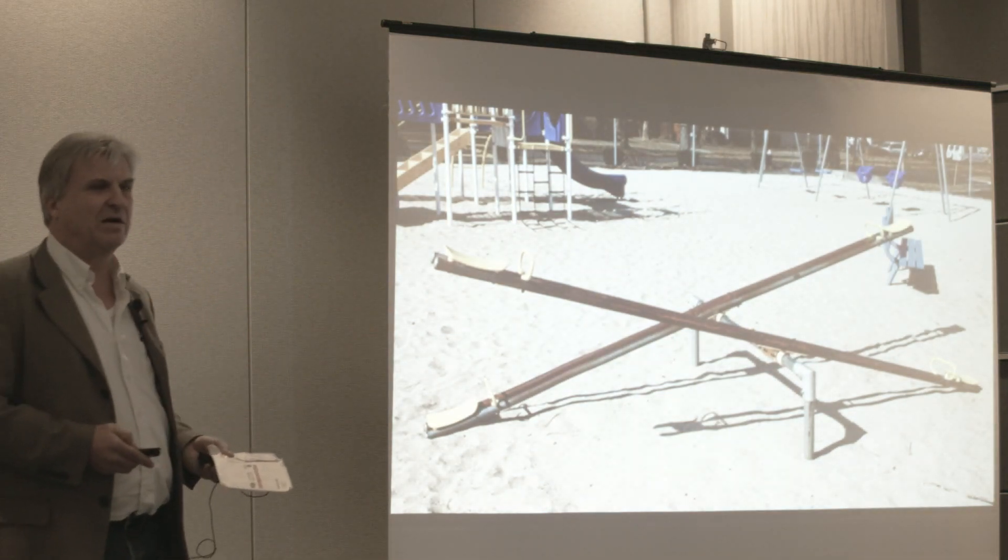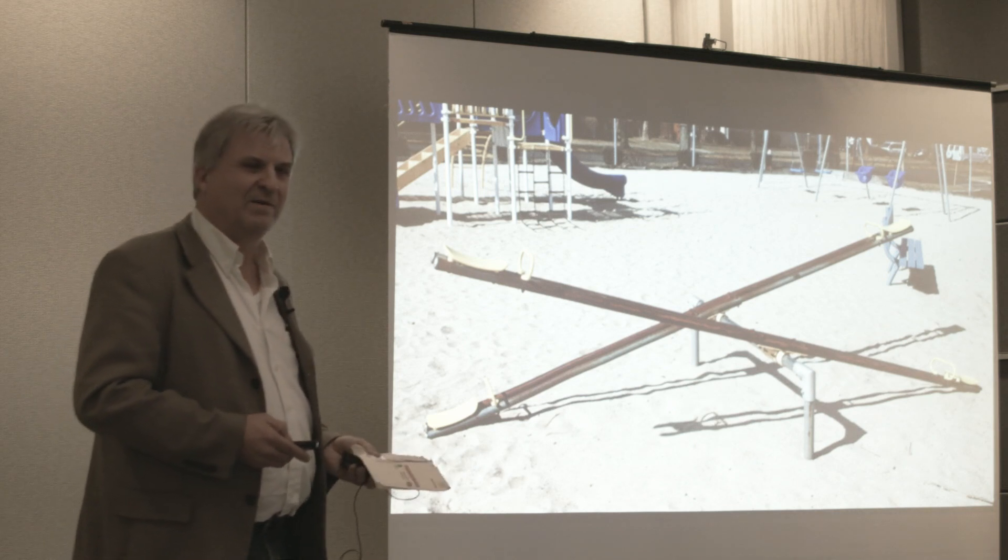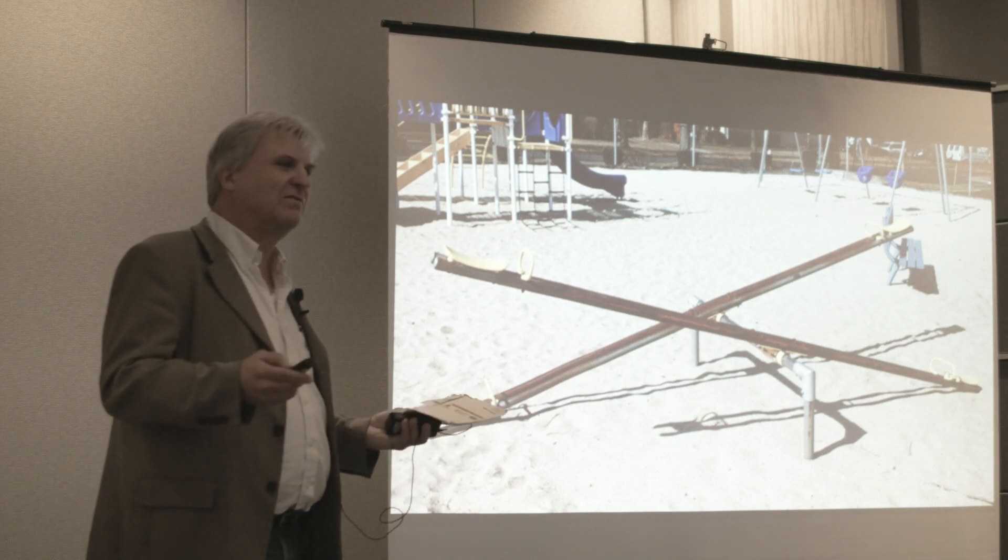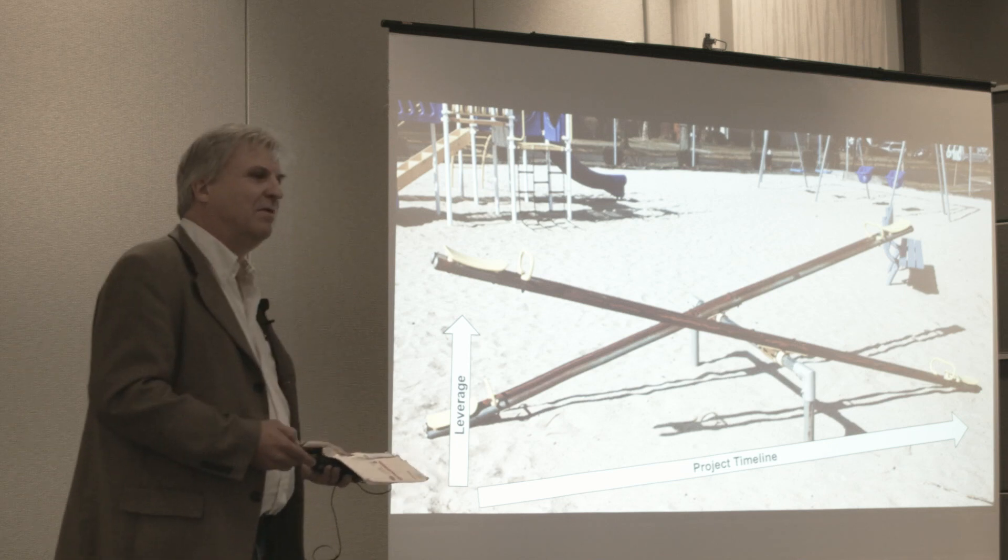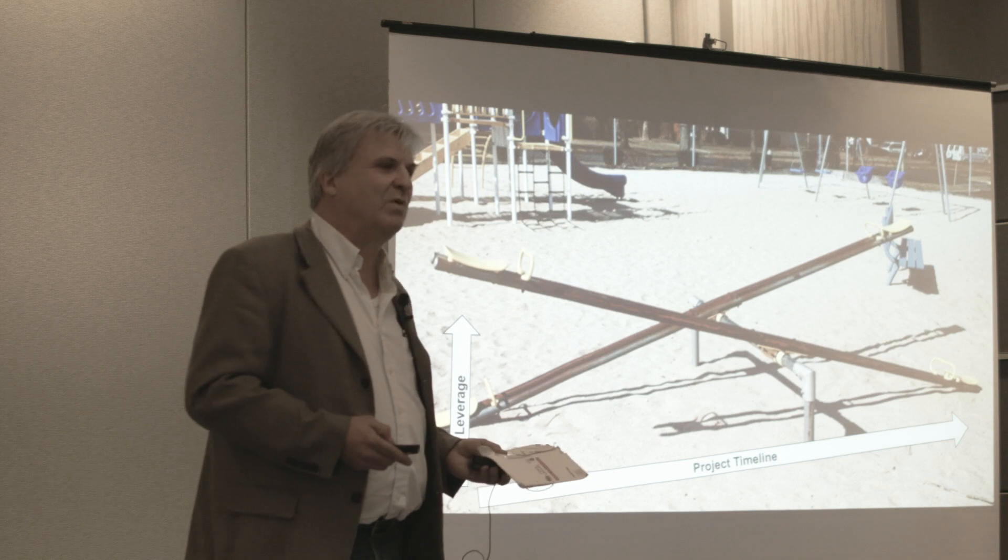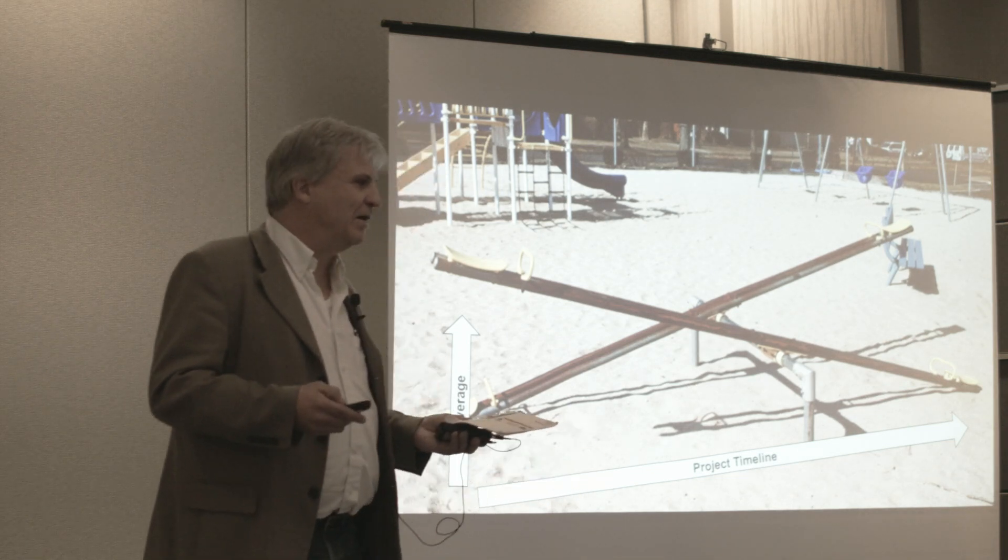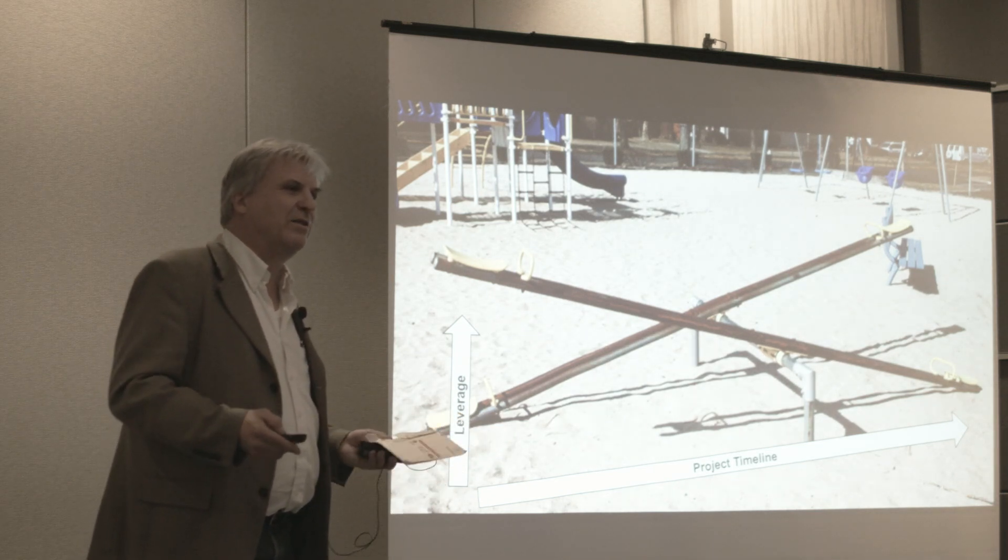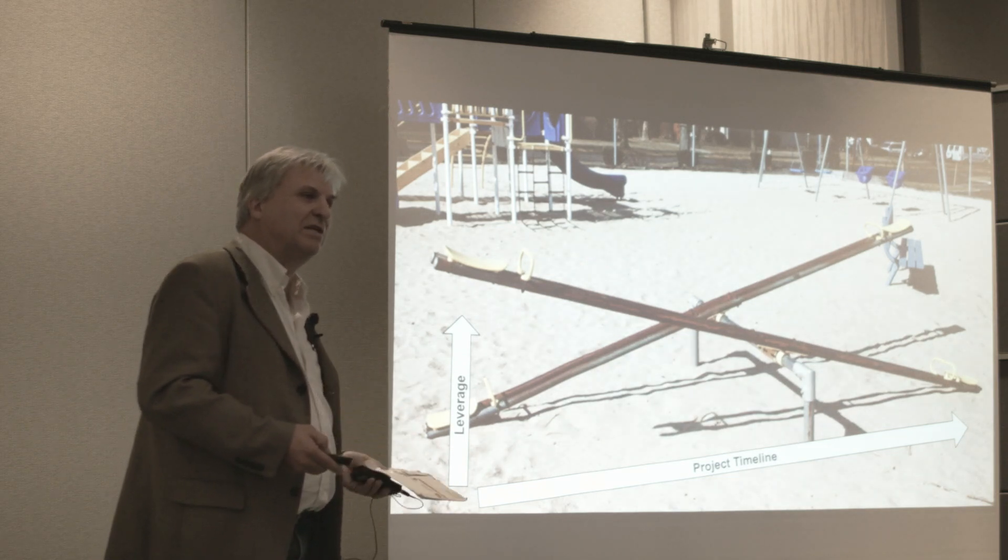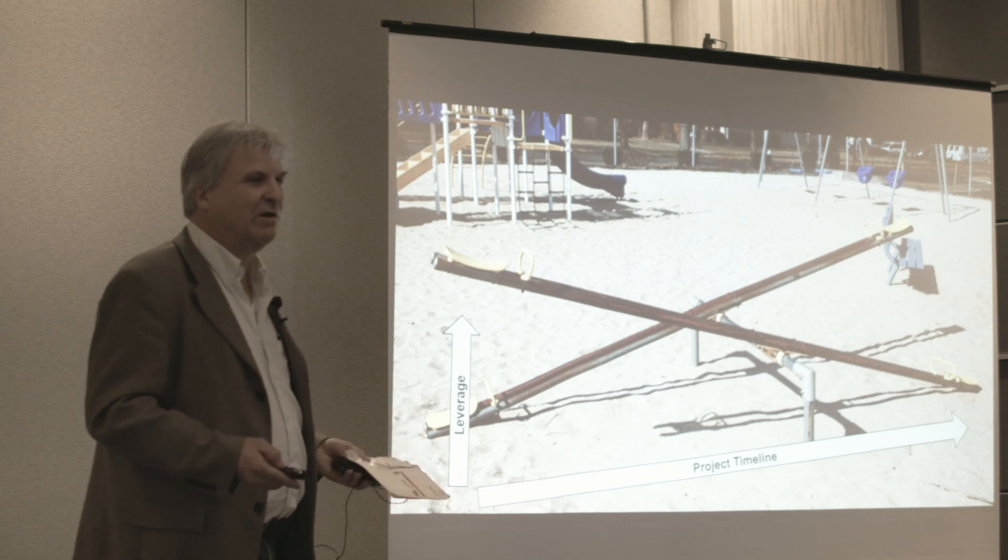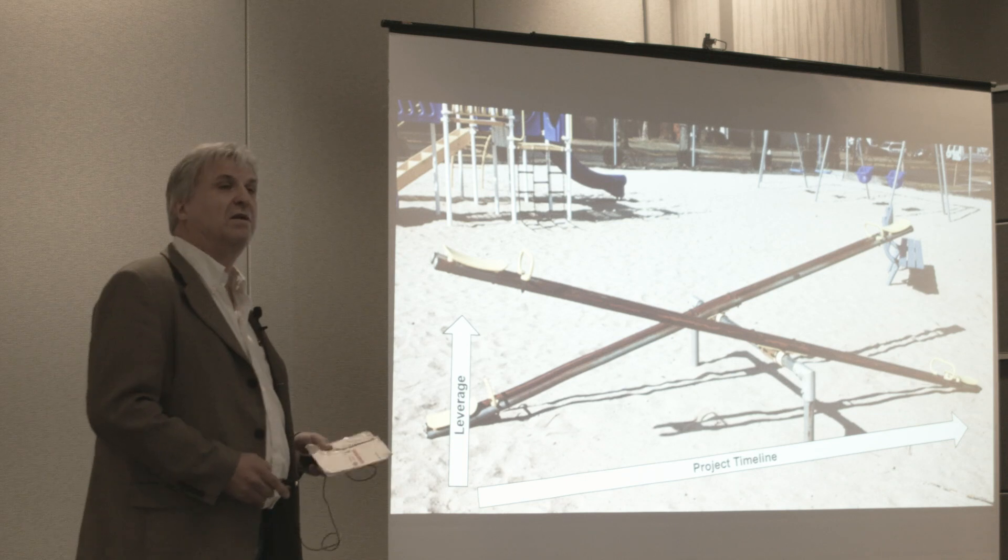This process, part of the problem is that systems engineering itself depreciates as you go through a project. The value gets less the longer you wait to apply systems engineering. You guys all know what this is—it's an icon of American playgrounds, a teeter-totter. As a novice of teeter-totter, you know where the leverage on a project is. It's way out in the early part of the stages of the project. If I lay a program or project schedule timeline underneath it, you can see that all the leverage is way up front in the early stages of the life cycle. This is why Simon Ramo, the R in TRW, in a quote from his keynote speech in 1997 said, 'All the really bad mistakes are made the very first day.' That's true because this is where all the leverage is. The longer you wait to do systems engineering, the leverage gets less and less. Don't be wrong—you can still do systems engineering, there's still value in doing it. It's just the value is less the longer you wait to apply it, which results in a great deal of waste.